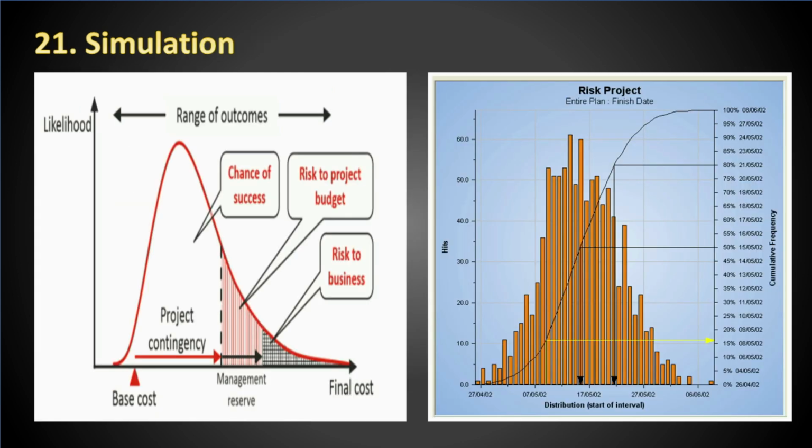Simulation techniques. Simulation techniques consist in sampling the input and characterizing the uncertainty of the corresponding output. This is notably the case of the crude Monte Carlo method that is well suited to characterize events whose associated probabilities are not too low with respect to the simulation budget.